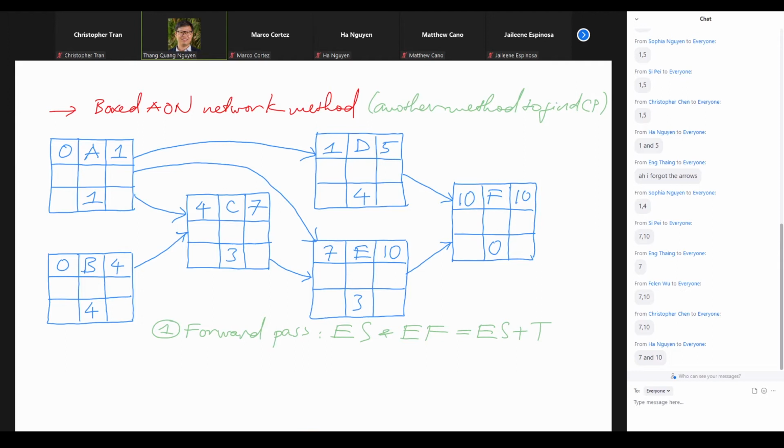The arrow also goes in the time order. So we go forward, tracking along the arrows, so that we go to the next activity and also do the earliest start and then the earliest finish dates, right? So by now we already fill in all the numbers at the top row. The top row is for the earliest dates, and we are done with those.